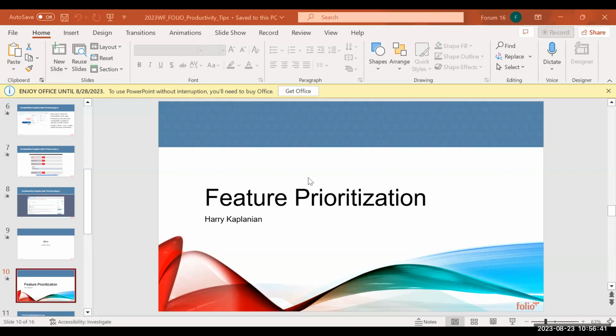The same goes for time criticality, 1, 2, and 3, right? In this case, I totally made it up. Here's your risk and opportunity. We sum them up. And then the job size works the same way. You're going to set a default job size, which is going to be the smallest job, which is going to be 1, and everything else is going to be a multiple of that. Then we do the summation, we divide it, and we end up with this rank.